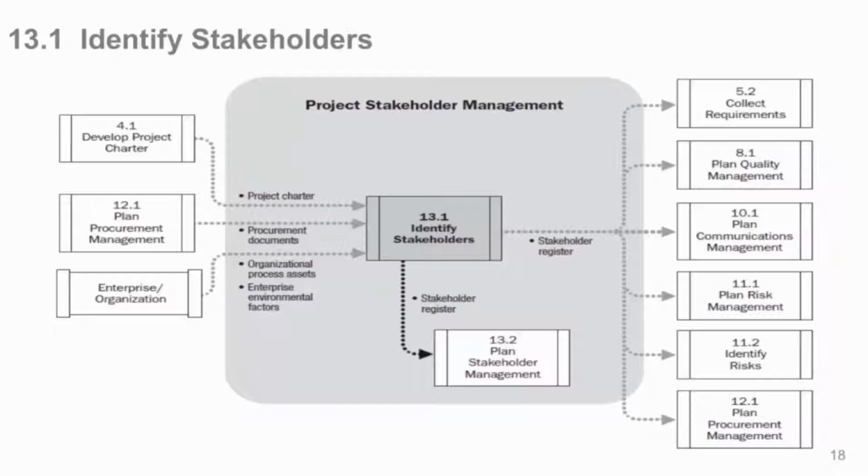The project management procurement documents come in, and why? Well, stakeholders may have an interest in some of the procurements that are outstanding out there, and they may have influence over a supplier. They may have a good relationship with an external supplier, which may be a benefit to you, or if you're trying to purchase things later on for the project, that particular stakeholder may be a detriment to you because they may be pushing for a certain supplier, whereas your analysis says, no, we really ought to buy it from this guy. So you need to know these things up front if some of those relationships exist.